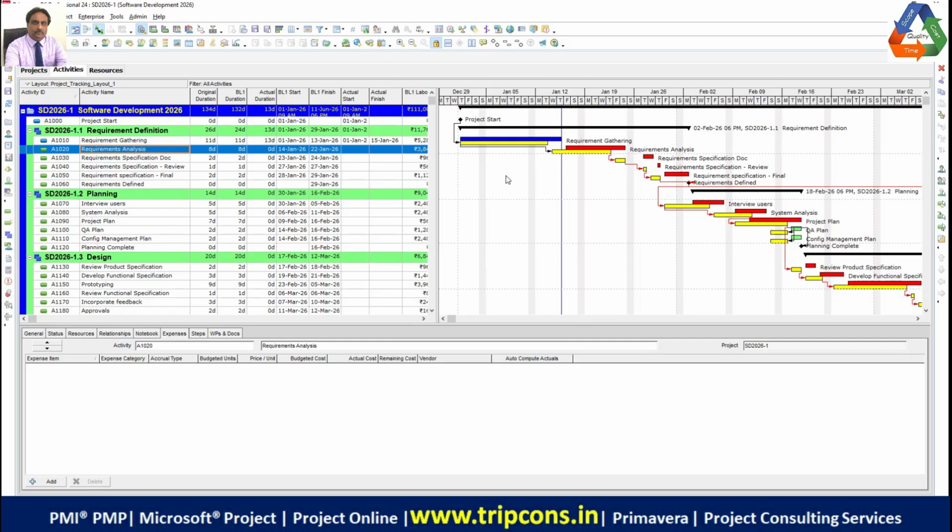What we have done is execution, we have done monitoring. Now we have to do controlling. So controlling means taking a corrective action. Okay. So now you tell me, Faith, if you are delayed on the milestone, do you think the client will be in a mood to pay? Of course, no. So what you do, you call for a team meeting and you tell your team, guys, we have to pull up, we have to crash.